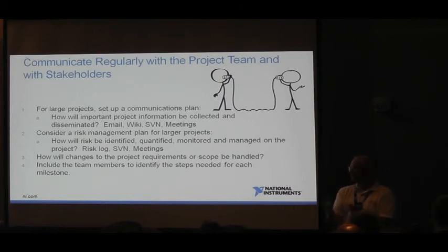What we did, we knew that delay in equipment was coming, so we created a simulator, a little box that simulated the unit under test. We created all of our software and all of our testing systems, and we could run it with that simulator, flip the switch, simulate the unit doing a certain action, so that when the environmental testing equipment came in, we were able to hit the ground running, and we completed the project on time.